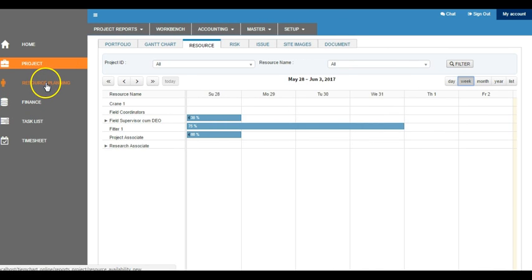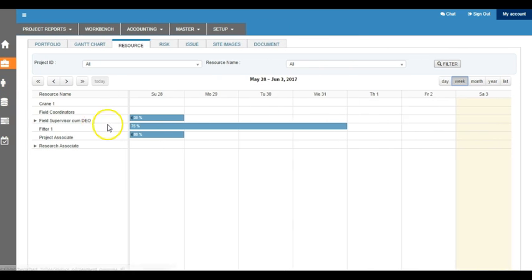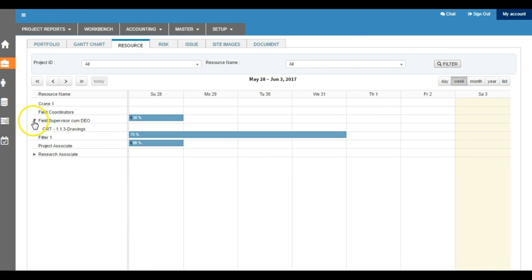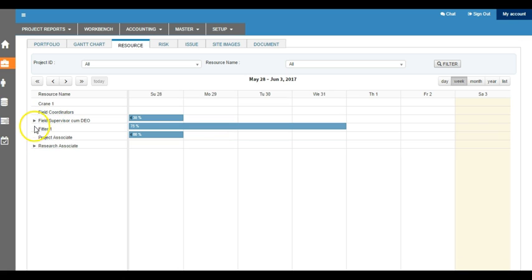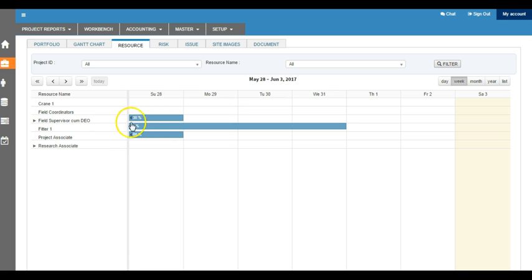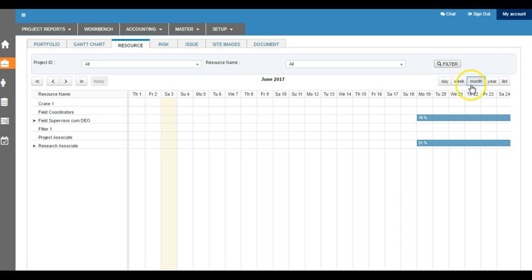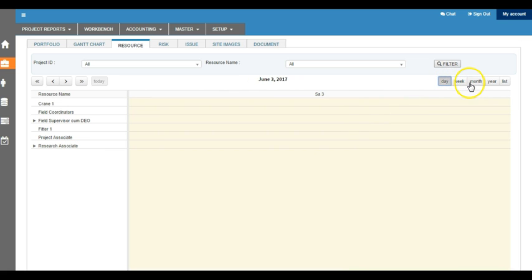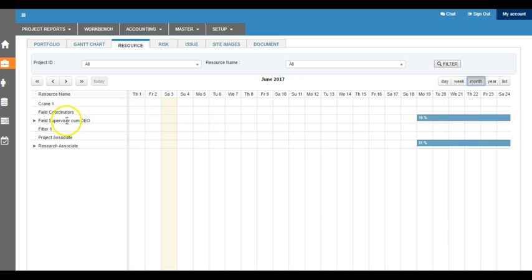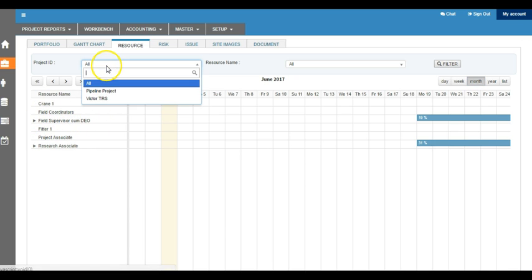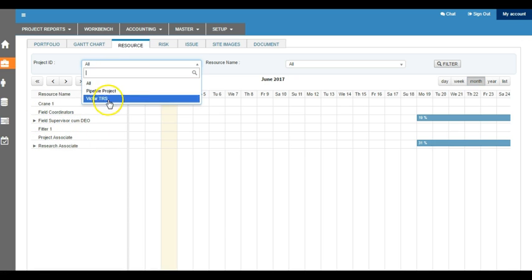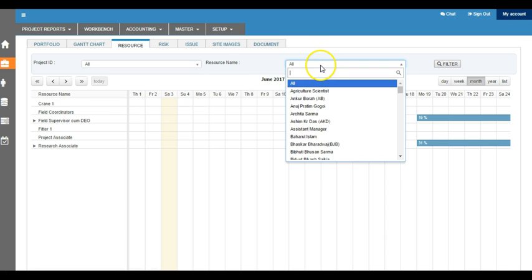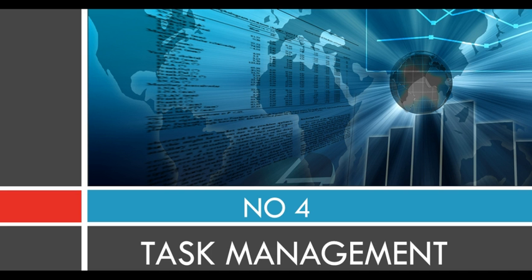And when you come to the resource planning tab, it shows you the resources and what tasks we have assigned to that particular resource. Whenever the assignment is going to be more than 100%, it will show up in red. We can always see this in a monthly way, weekly or daily basis, and it brings out the list of all resources. Default will be all projects, and we can see for each individual project and also we can filter out for each individual resource.